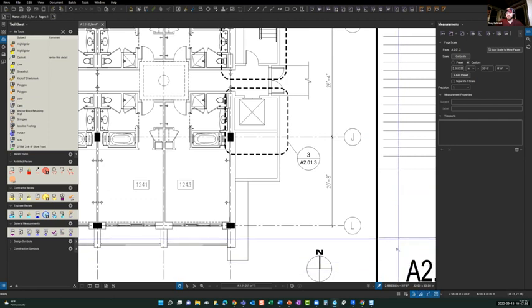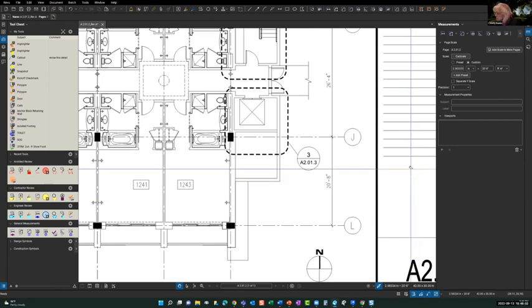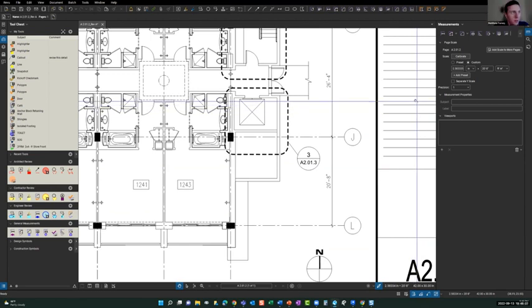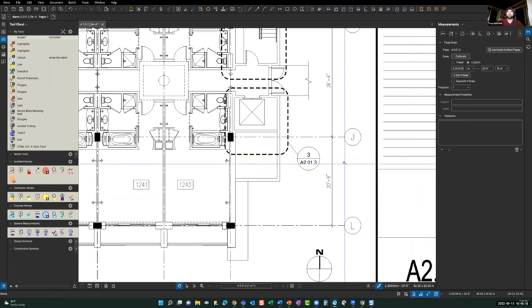Okay, was there a question? No. Okay, I wasn't sure if I heard somebody trying to interrupt me. Hey, real quick, when you're calibrating it, is it best to use a larger dimension or a smaller dimension, or does it really matter? It'll be more accurate if you have a larger one. Yeah, that's a good point.